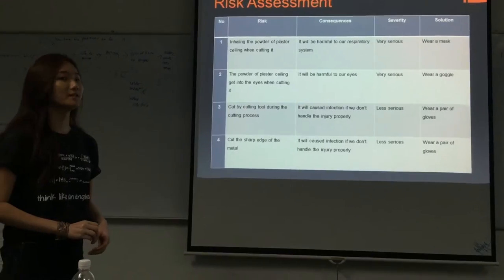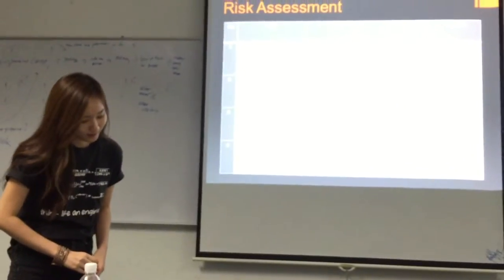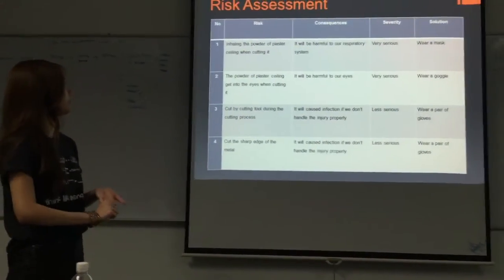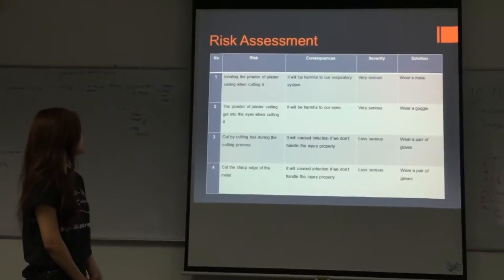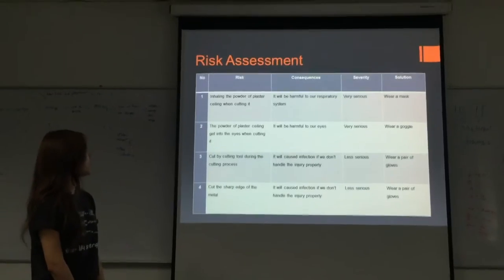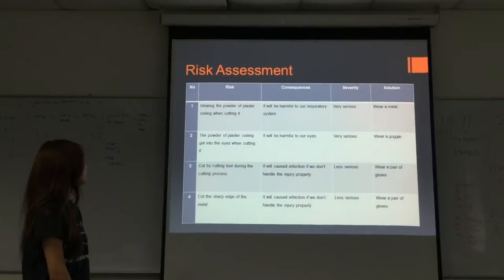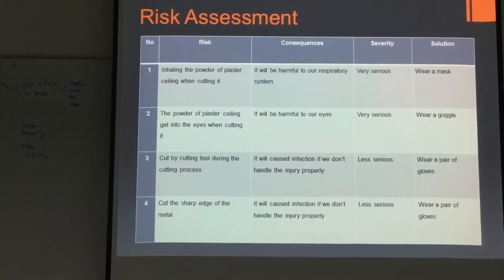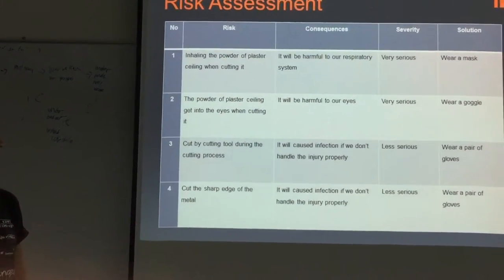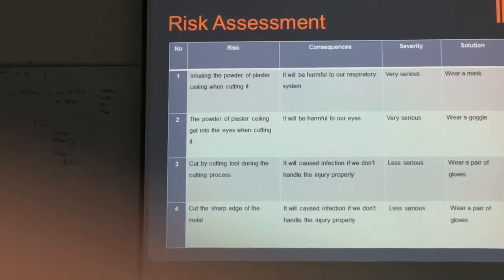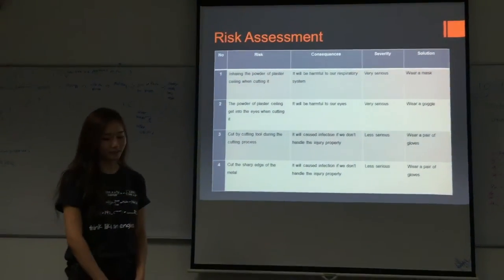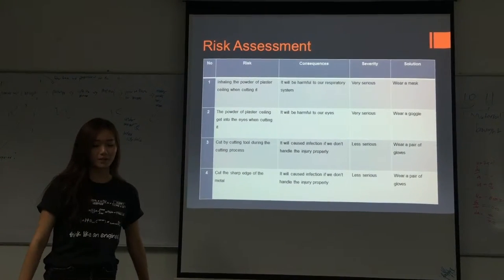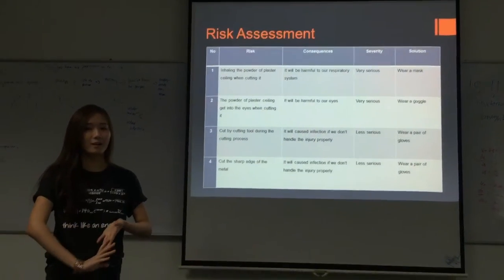Finally, the risk assessment. There are four possible risks that may occur during the process of building our project. The first risk is inhaling the powder of plaster ceiling when cutting it. The second risk is the powder of plaster ceiling getting into the eyes. The third is being cut by a cutting tool during the cutting process. And the last is being cut by the sharp edges of the metal. With the risk assessment, we can minimize or prevent the possibility of getting hurt during the entire process.